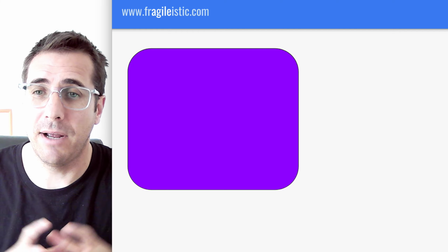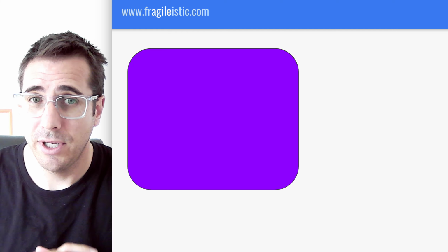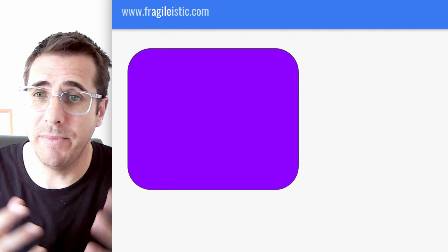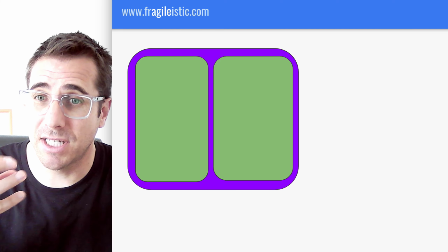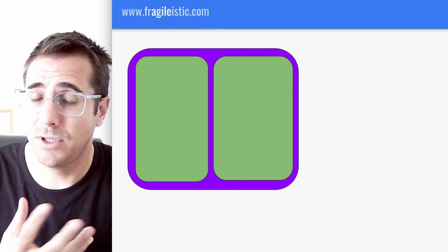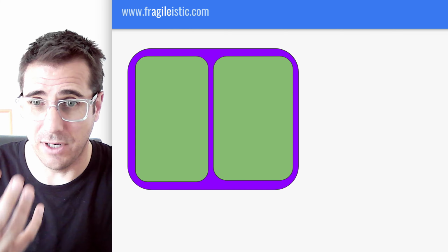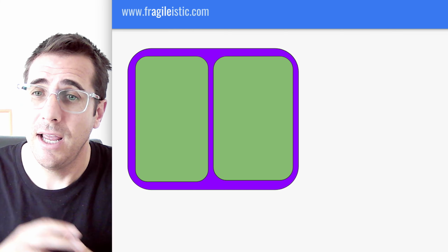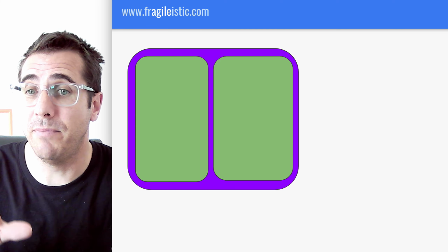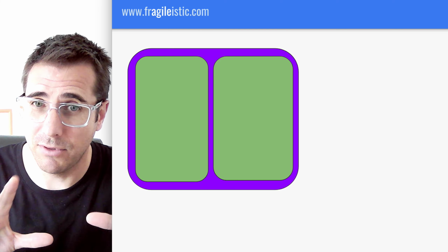Let's start with a big folder now. In Jira, that's called an epic. And they're that color, purple. You put them into the system and call them an epic. What you can then do is put items inside that, called stories. So the epic might be something, going back to my landscaping, we're landscaping this entire industrial estate, and the two user stories are for building 1 and building 2.